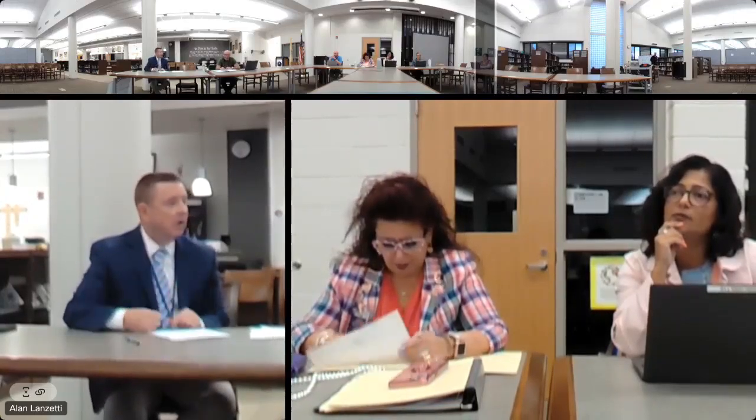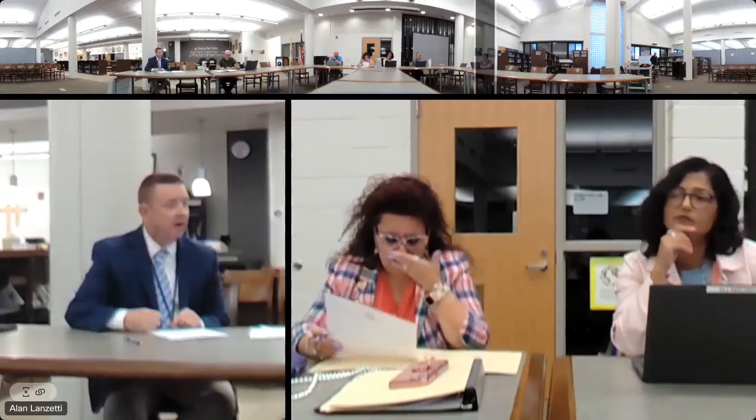As I previously mentioned, essentially what happens there is we start right away with equipment submittals. We'll get them processed very quickly. And then it's just kind of a sit and wait until that material comes in. Hopefully it arrives by spring break, and that's when we kind of start work. And then we hit it hard following summer of '25, which will go into fall of '25. We should be wrapped up by about Thanksgiving, which is good timing for us to move into the heating season with the new system in place.